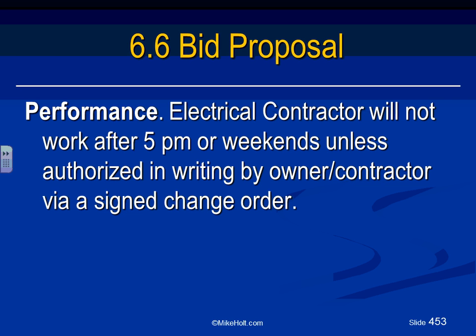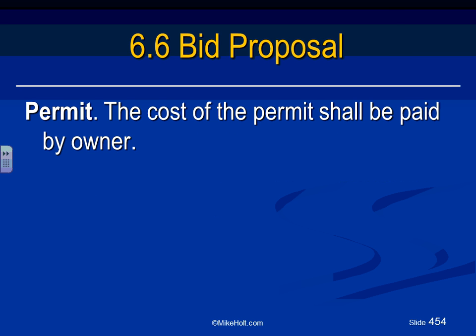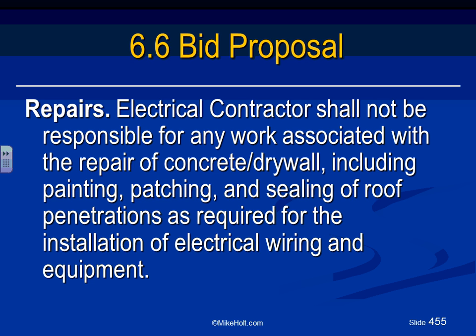So if the owner wants you to finish this one after 5 p.m., great, change order. And with the change order comes extra cash to accommodate the extra labor, the extra dollars they have to pay the labor on a weekend or after 5. Permit, who's going to be doing the permit? You're going to see either the cost of the permit added to your project or the owner is going to do the electrical permit.